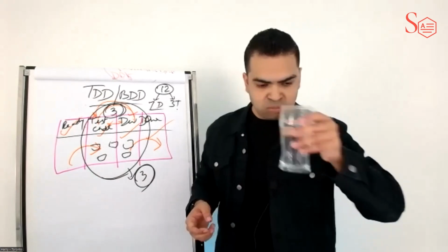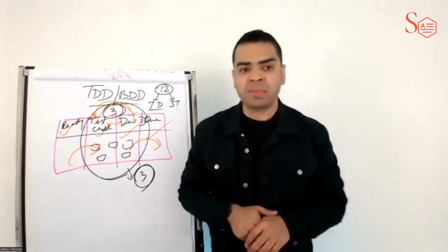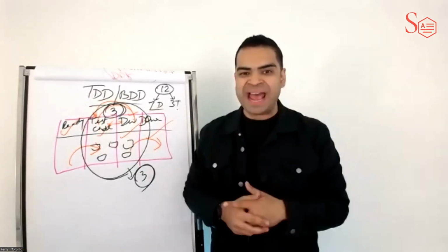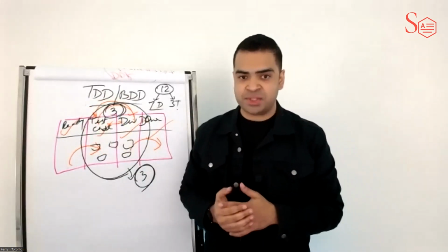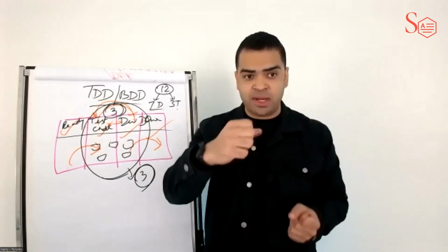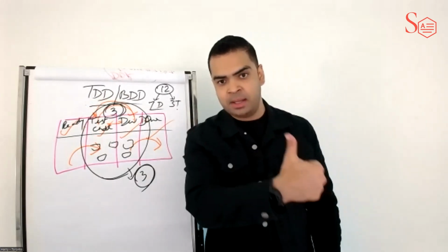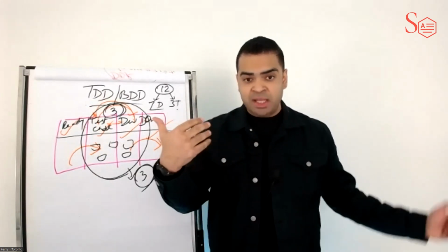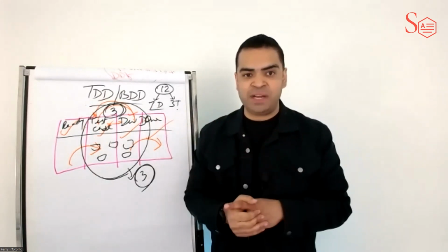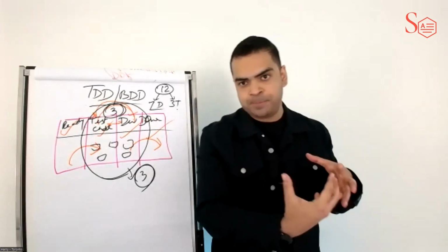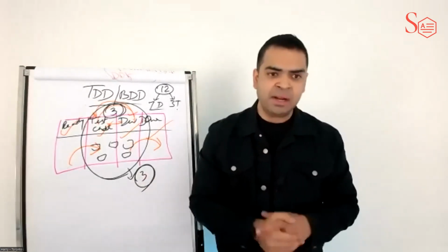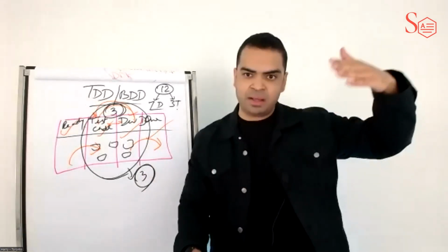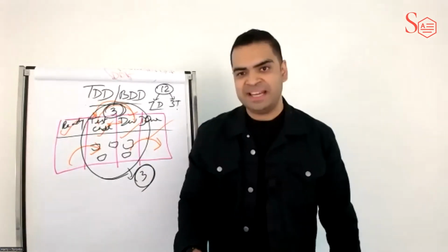It should increase efficiency, ideally. It's going to force those developers to collaborate on those 5 stories, which means that those 5 stories would likely get done a little bit faster earlier in the iteration, which means they would be able to test and get feedback on those 5 stories a little bit earlier in the iteration. And in most scenarios, according to research, it would increase the velocity of this team.